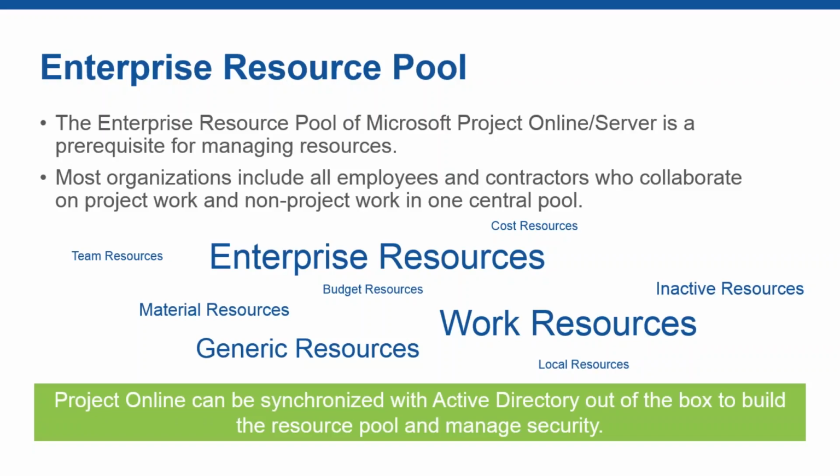Those are basically resources that are inside the enterprise resource pool. Now those people can be employees, contractors, whomever you need to have in your pool that you need to collaborate with. Now typically these resources are what we call work resources. That's basically the Microsoft product term for human resources who work on your project. But what we also pointed out earlier on, it's also really important to start thinking through, well, what are roles inside our organization? Are we working with developers, or maybe we talk about senior developers and junior developers?